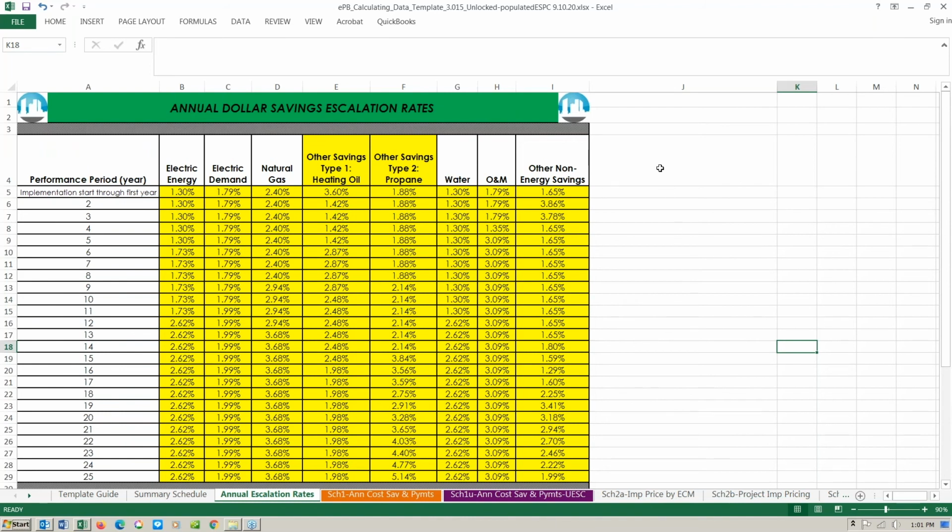So I'm emphasizing here for all listeners that this should be conservative at best, because these will set contractually what the dollar savings will be each year of the finance period. Whether or not these escalate will still contractually bind the owner to agree that that escalation has actually occurred and that increase in the cost savings has occurred as well.